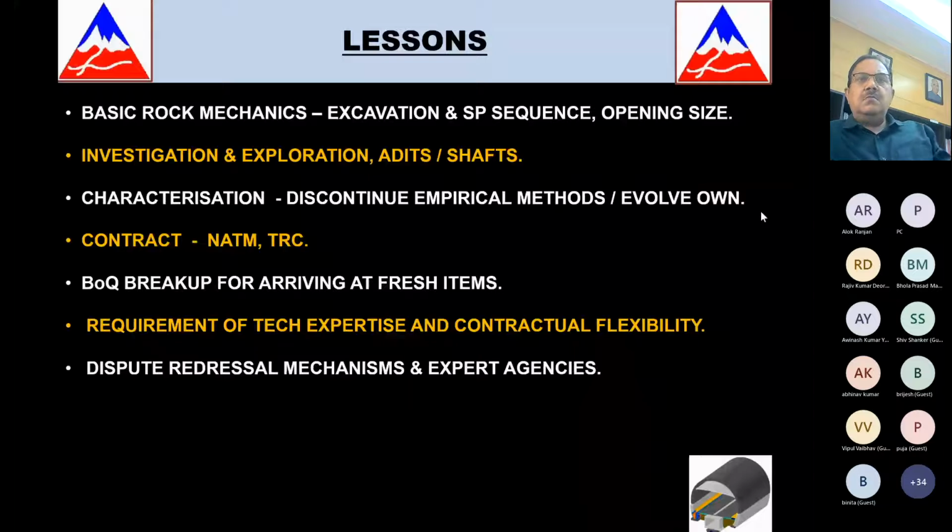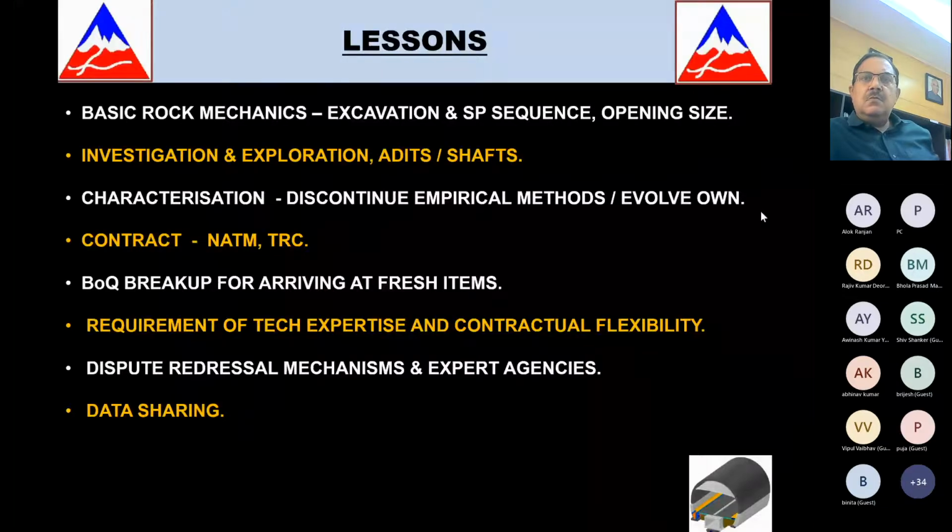Data sharing, this is something I've believed in. We were doing this Rotang tunnel, and very close to us was AD Hydro, which was done a few years ago. And we did not even pick up their face logs to see. So I would always suggest that whenever we do tunneling, we maintain proper face logs, and within the fraternity working on tunnels and such structures, we should share this data, so that if somebody does work in that general area, at least they have some kind of a reference geology available.